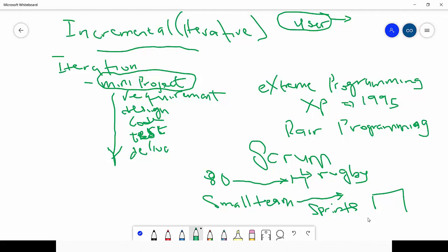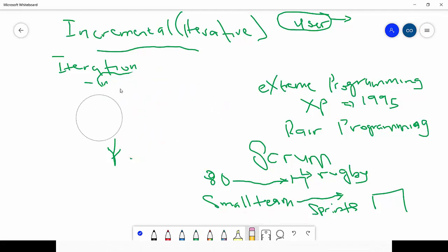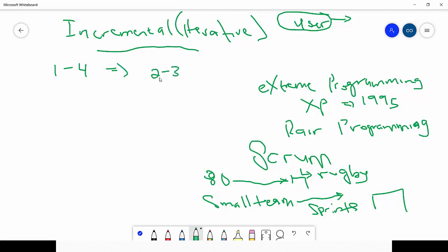All right, now a Scrum is characterized by the sprints, which is an iteration between 1 and 4 weeks. Okay, so each sprint, since it's called a sprint, you can already know that it's going to be a fast process. So, depending on the organization you work for, a sprint can take anything from 1 to 4 weeks, right? The sprints that I'm more used to take between 2 to 3 weeks, right? So there's a sprint every 2 or 3 weeks.